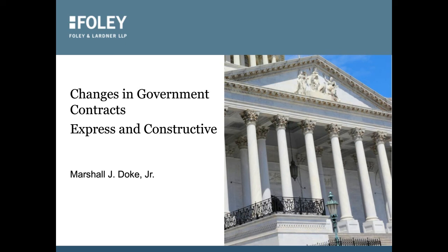Thank you, Marshall. And I would just add that in addition to getting interest once you submit your claim, in the request for equitable adjustment stage, the REA stage, you can recover your legal fees and accounting fees that you incur in preparing the REA as part of that REA. So when you convert the REA to a claim, if you can't resolve it at the REA stage, your attorney's fees and accounting fees that you incur to put together your justification become part of that claim. So my pitch to you is if you have a change, get us involved early at the REA phase, because then we can help you develop it factually and legally, and then those costs will become part of the claim, as opposed to once you come to us with the claim at that stage, then your legal fees aren't covered, although you do get the interest.